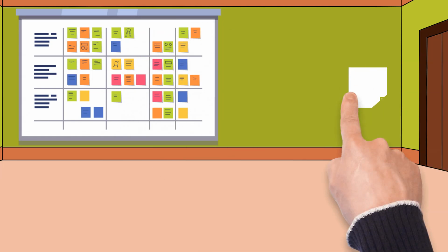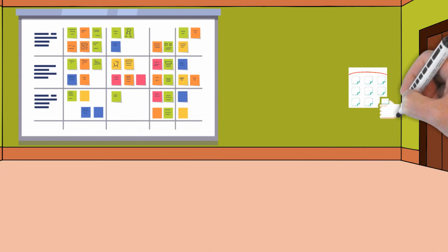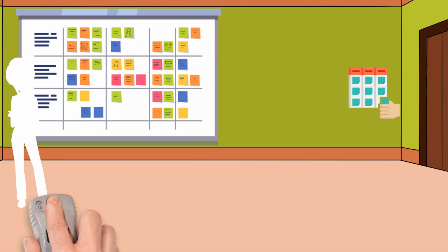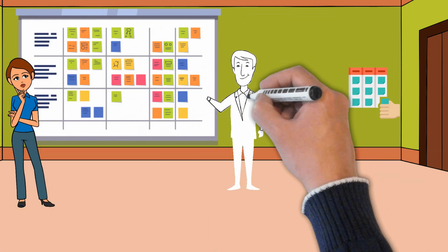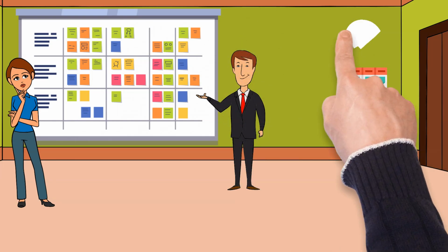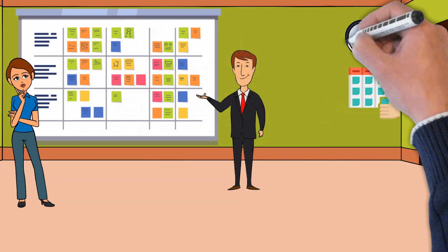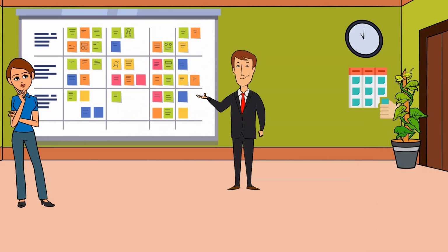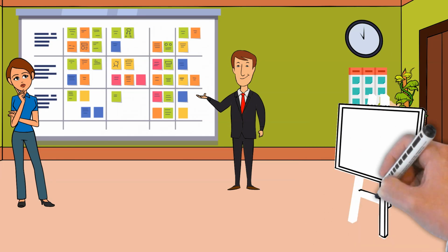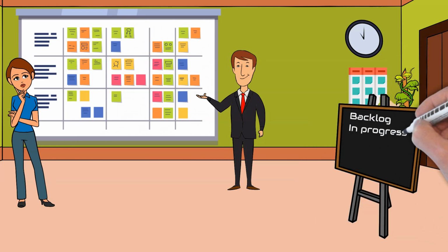The Agile board represents the sprint backlog and gives us an overview of all user stories that will be implemented in the sprint. The board also shows the progress of work. The development team is the owner of the sprint backlog and the Agile board. Each team member chooses the story they will work on. The board shows the current plan to reach the sprint goal. It is also at the center of the daily Scrum meeting, which focuses on progress and impediments. It is the information center in the sprint.